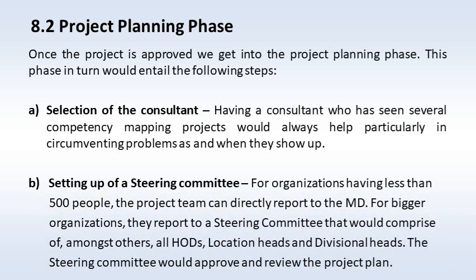B. Setting up of a steering committee. For organizations having less than 500 people, the project team can directly report to the MD. For bigger organizations, they report to a steering committee that would comprise of, amongst others, all HODs, location heads, and divisional heads. The steering committee would approve and review the project plan.